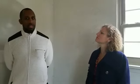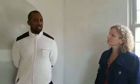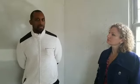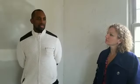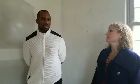Unfortunately, I think people's nature is to get a lot and give a little. And this is definitely an environment where, it's not specific to contractors or tradespeople, but much is going to be asked while receiving a little. And it's not a space to do that. Otherwise, you end up in a project, say a $40,000 budget, you've paid someone $20,000 and you don't have much to show for it. It's not specifically what happened here, but generically, don't give up too much money without getting too much work into it.